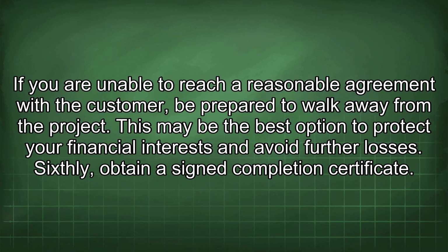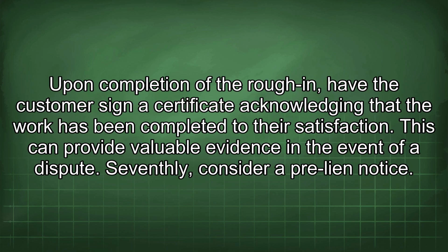Sixthly, obtain a signed completion certificate. Upon completion of the rough-in, have the customer sign a certificate acknowledging that the work has been completed to their satisfaction. This can provide valuable evidence in the event of a dispute.